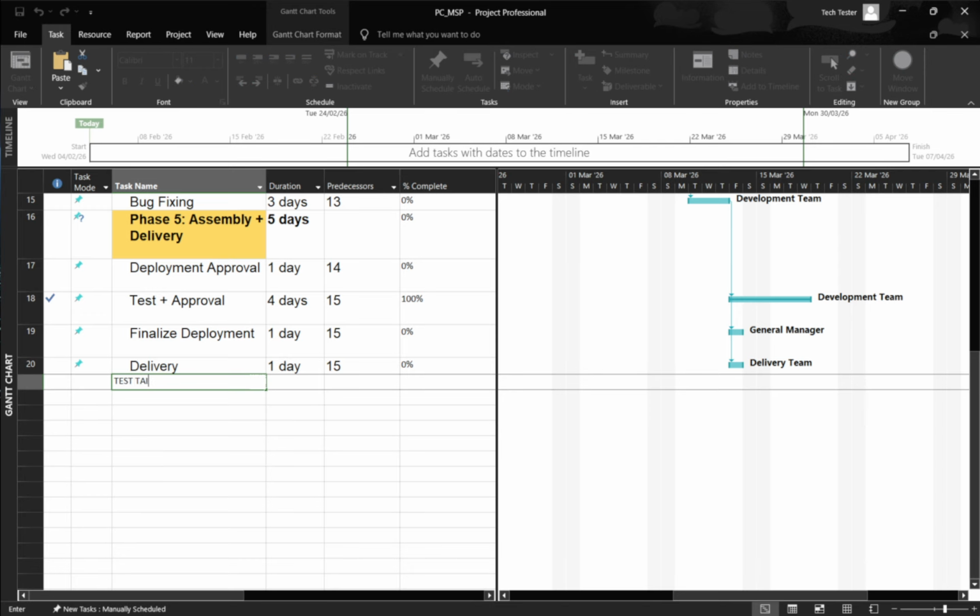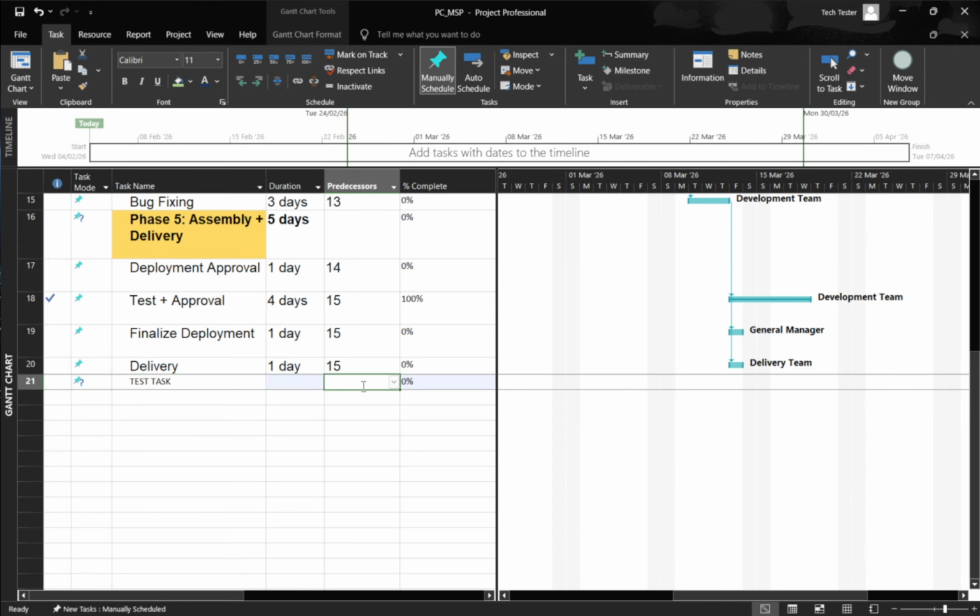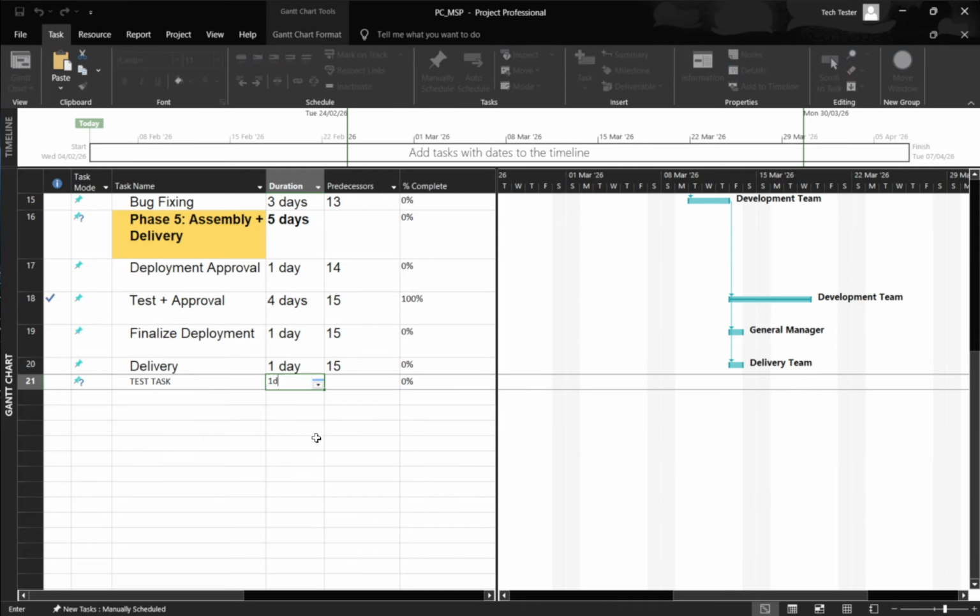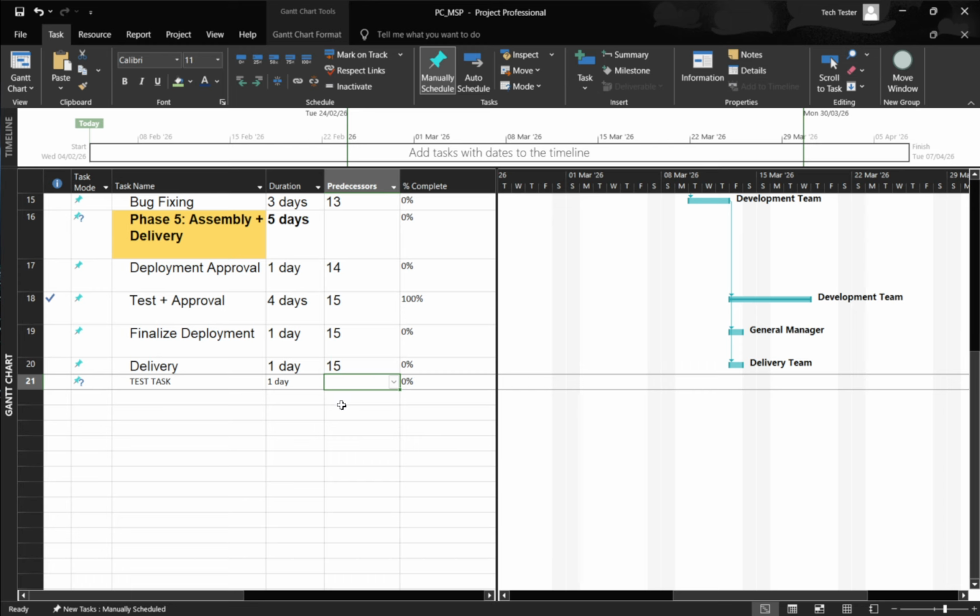Just scroll to the bottom and start typing in the next empty row, and Project will create the task for you automatically. After inserting, it's a good practice to review any dependencies or constraints that might be affected, especially if the new task belongs between linked tasks. And if you make a mistake, you can always undo immediately. With these methods, you can keep your plan organized and accurate without breaking your stride.